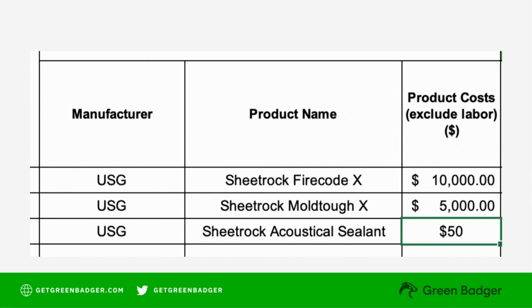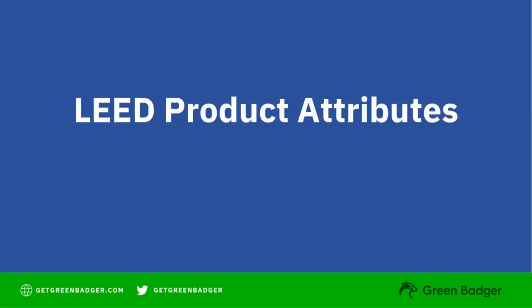Identify each product you're using, list them individually in a separate line item, and show product costs excluding any labor. Next, we're going to look for any LEED attributes that these products might have.